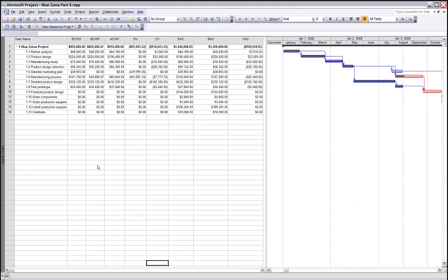So the next question asks what do the PCIB and the PCIC indicate in terms of how much of the project has been accomplished to date? And this is just a simple calculation. You can go to your text on pages 435 and 436 to calculate those project percentage complete indexes out. And what you'll find is that both of them indicate that about 64% of the project is completed at this time.